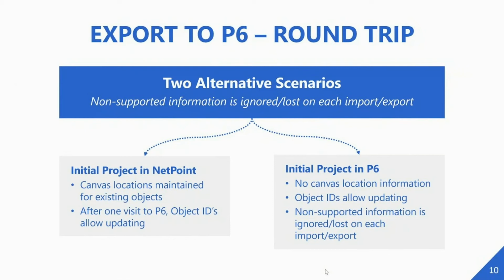However, if the initial project starts in P6 and you import it into NetPoint, NetPoint does not have any layout information for those objects, and therefore it is necessary for the user to either manually lay out the objects in the project or use the simple interface of autograph to lay out their schedule as they wish.